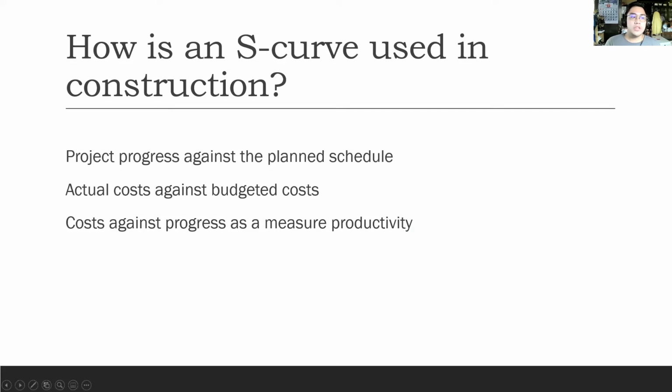Construction companies could even use S-curves to plot activities like the number of permits created or inspections conducted to better understand resource allocation, and actual cost against budgeted costs. Most of the time, the most useful area of the construction S-curve is in measuring production activities, because this is where the rubber hits the road for construction companies in delivering the work they had planned to deliver.